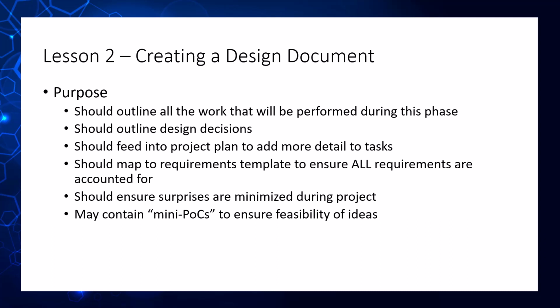And just also keep in mind that during design, you might have what I'll call mini POCs, where if you're not sure whether an idea is feasible or not, you can say, hey, let's take a day, let's build out a sample of that, or see how this will look, or see if this is possible, just to make sure that as you get to build, you're not going to hit any major issues along the way.